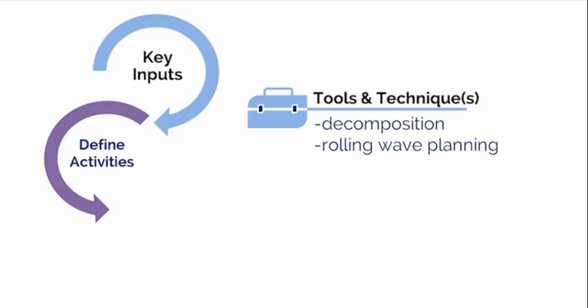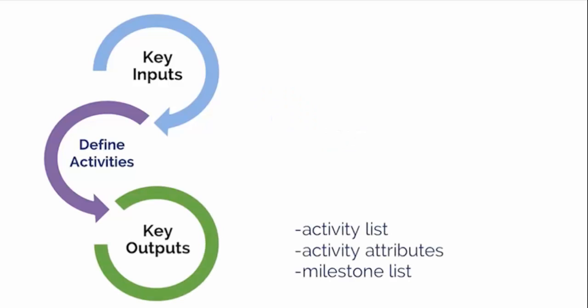Then, while schedule activities for phase 1 are underway, the detailed planning for phase 3 would commence. As phase 2 is put in motion, planning for phase 4 would start, and so forth. In this way, rolling wave planning permits work activities to move forward on current and near-term deliverables while planning is still ongoing for future work packages. Let's look at the key outputs of this process.